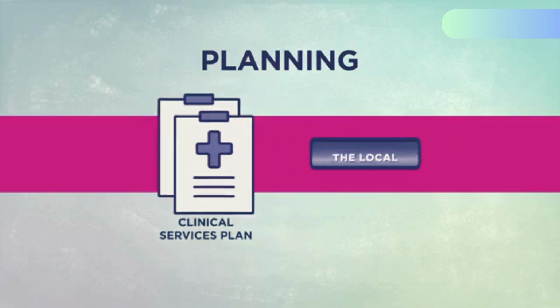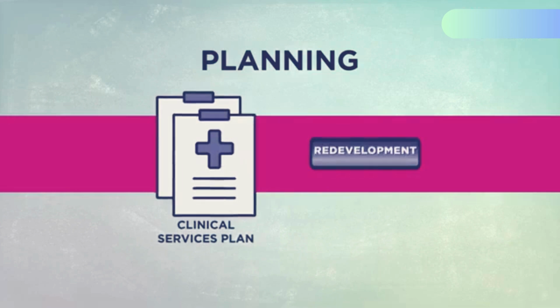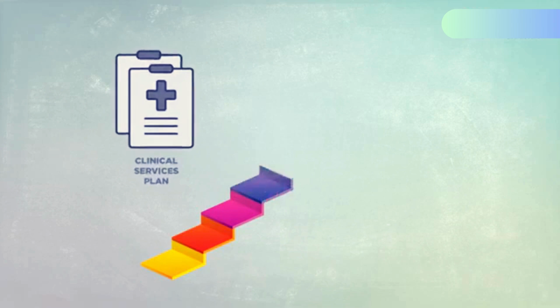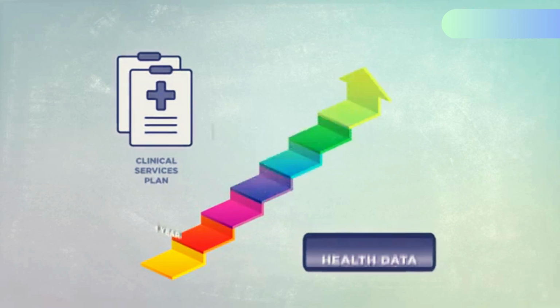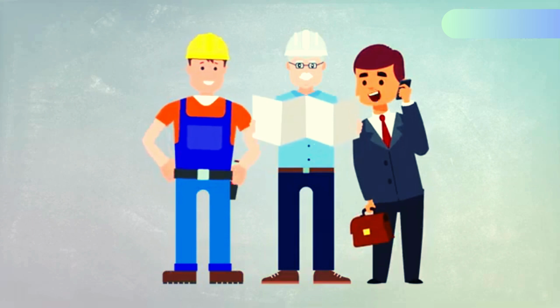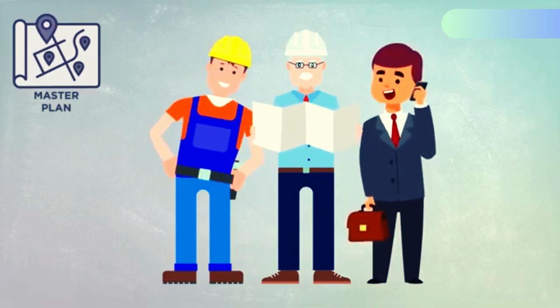Developed by the local health district, the Clinical Services Plan forms the foundation for our planning of the redevelopment. The Clinical Services Plan looks at least 10 years into the future, using current health data, census information, and projections of future local needs. Once we understand what's needed, we appoint a lead design team who develops a master plan